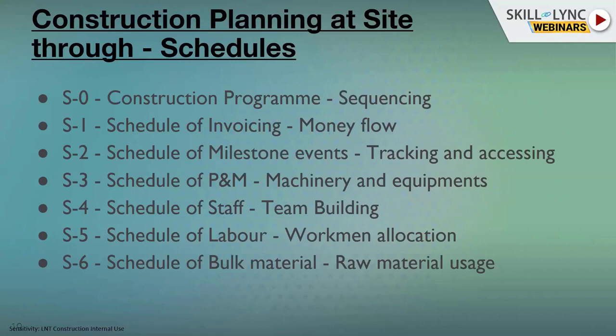Based on S0, all the other schedules — S1, S2, S3, S4, S5, S6 — will work, because how materials and things come out depends on the program. Similarly, as soon as the program is fixed, your money flow is also frozen. We hear about government projects stalling because invoices were raised but money wasn't coming — that's a project halt. Invoicing is also derived from the construction program — at what time, how many things will happen.